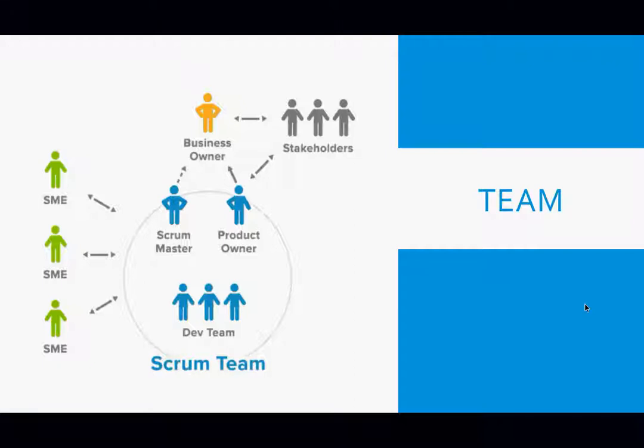So like I mentioned, you can have the login, the registration, the feedback, the posting, the blogs, different functionalities that you want to do. But at the beginning of the sprint, you look in there and say, oh, we want to do 5 items in this particular sprint. You bring those 5 items into the sprint backlog. And it's the responsibility of the product owner to prioritize those things and say, okay, this is what should be done next.